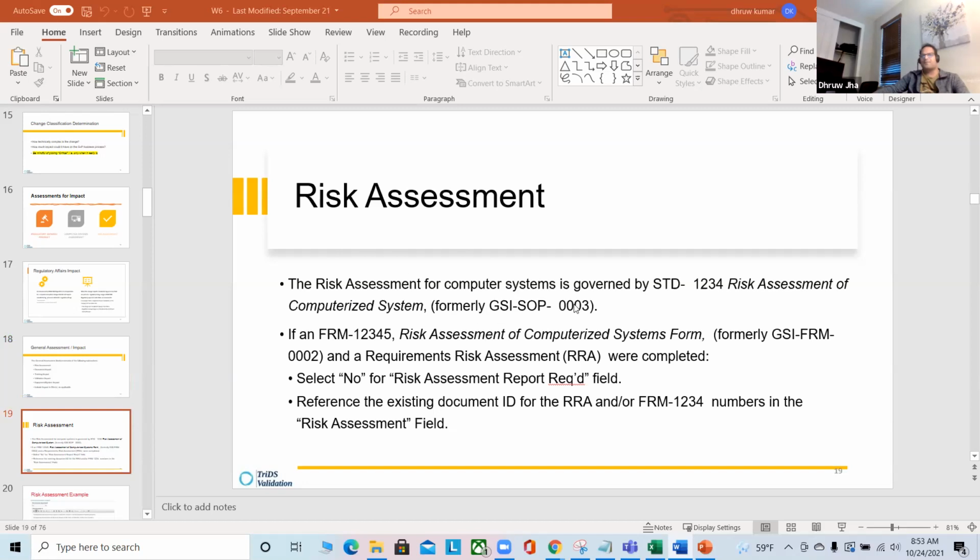For example, risk assessment: if you have any changes you are making, and if you're adding a requirement, or for example an interface, it might change your SLR or RRA. SLR you have not studied yet, which you're going to understand in the last class. But RRA you have done, so you understand how this RRA works. So the moment you add a requirement, now you have to update your risk as well. Am I right? So can you connect the dots now, how everything works? Can you guys see how this cycle works? Okay, very good.